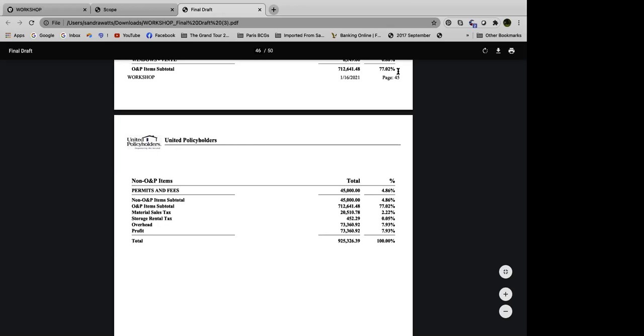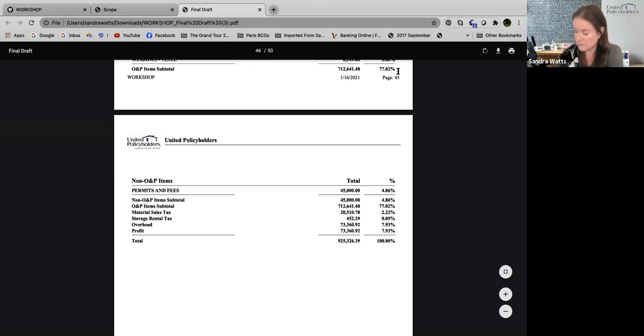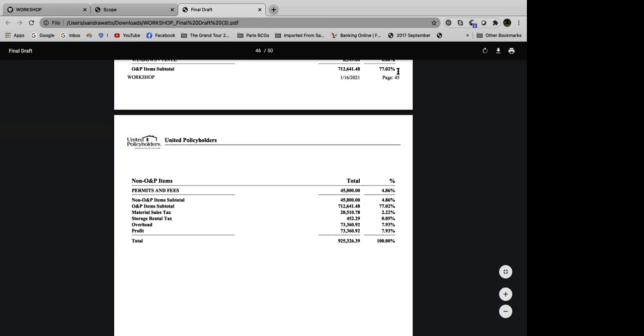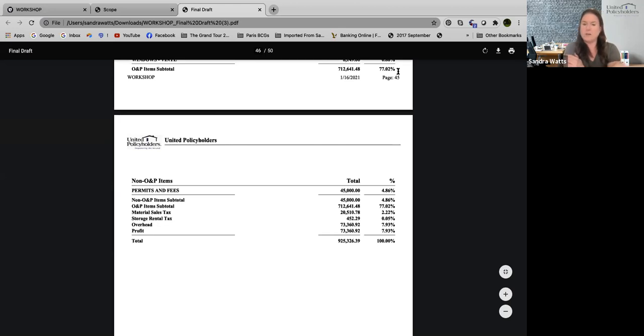So look at that. Actually, I have a question about that. Let me run through these others because Robert and Sue have been waiting a bit. Robert is with California Fair Plan. First simple question, do they use Xactimate? Usually, yes. Okay, and then he says they told him they'll only take the bid of the general contractor he's going to use, but he can get three bids. And so can they do that? No, that's untrue, Robert. They cannot.